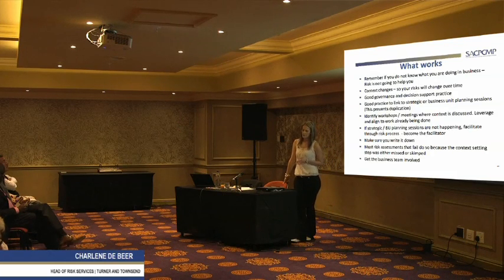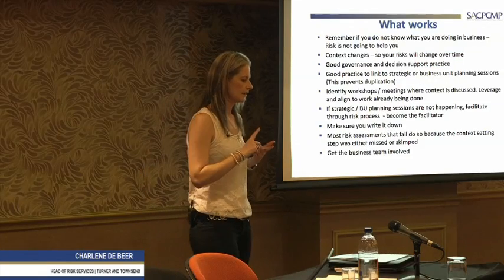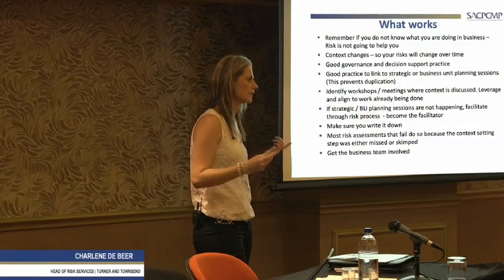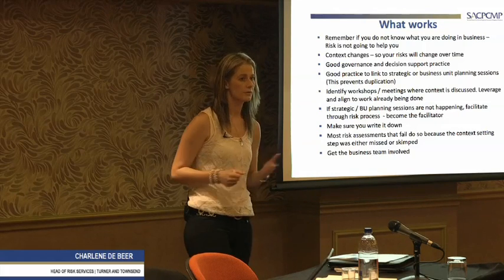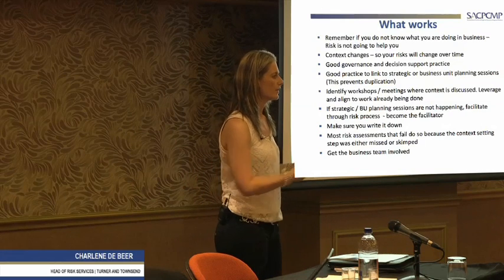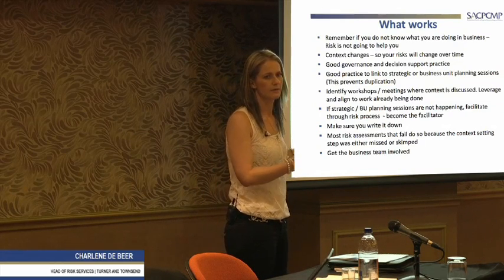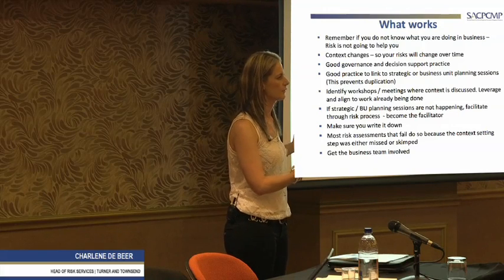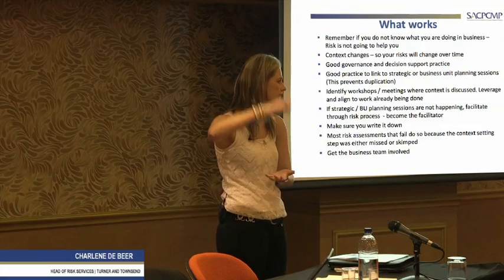And one thing we must always know, what risk management actually aids in very big, which we don't always grasp that well, is it builds history, because you never delete things from a risk register. You either close it or you move it to your completed actions, and it builds over the months. If you do it correctly, when we go to adjudication or arbitration, which the majority of projects go to these days, which is quite sad, we can prove from our side that we've done all we could, or we did try and do a lot of things, and this is actually what we've put in place, and we've done X, Y, and Z.